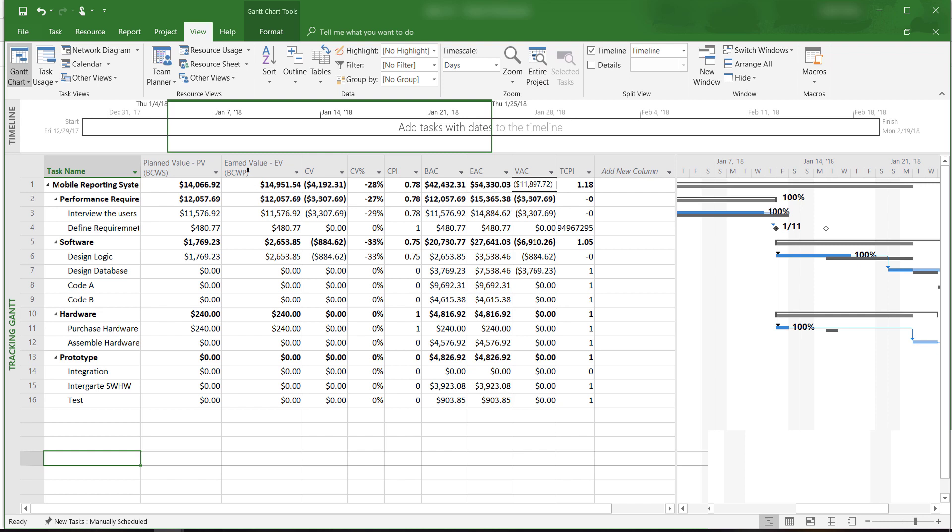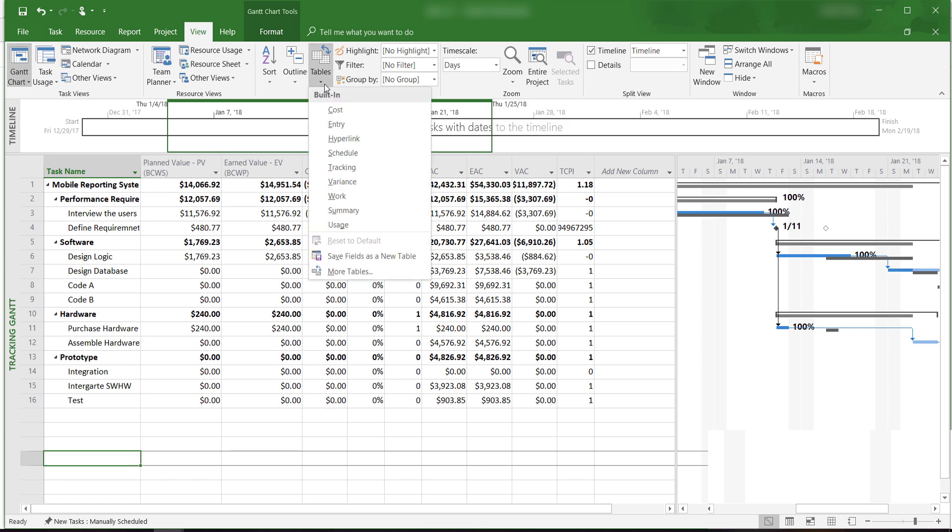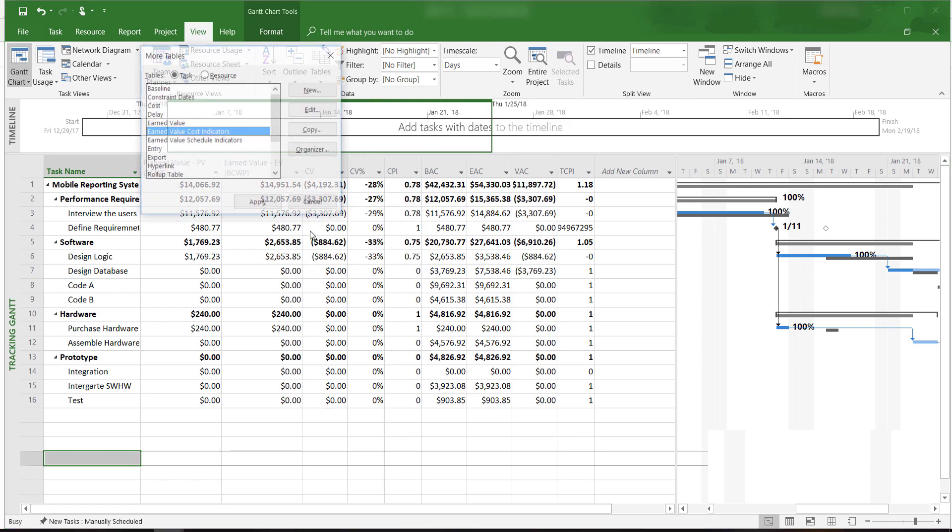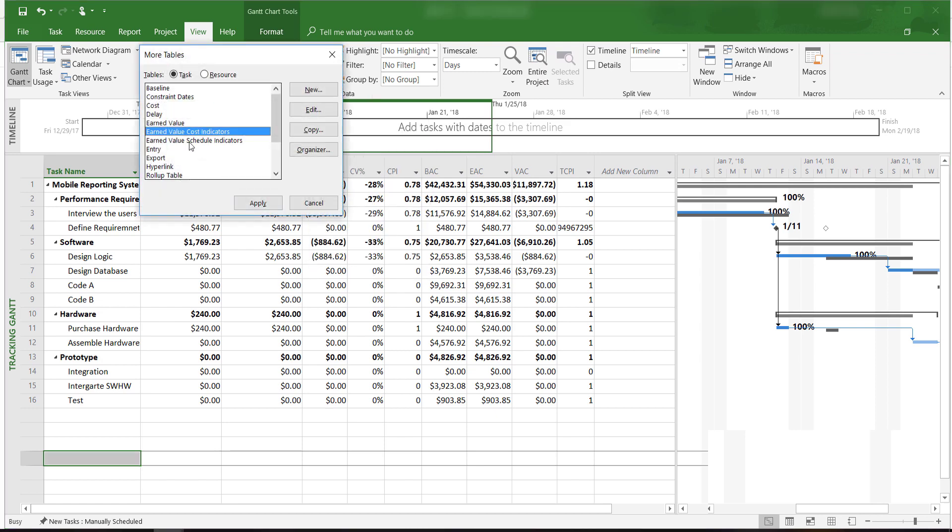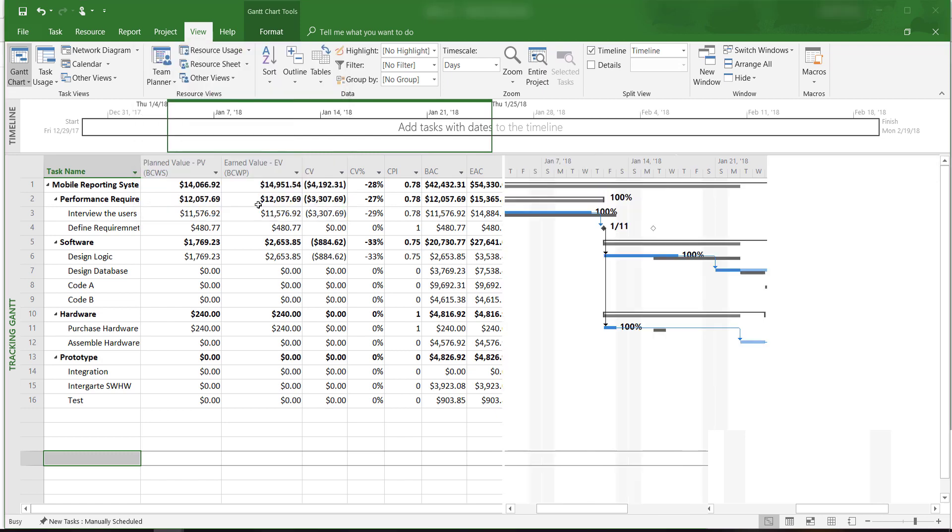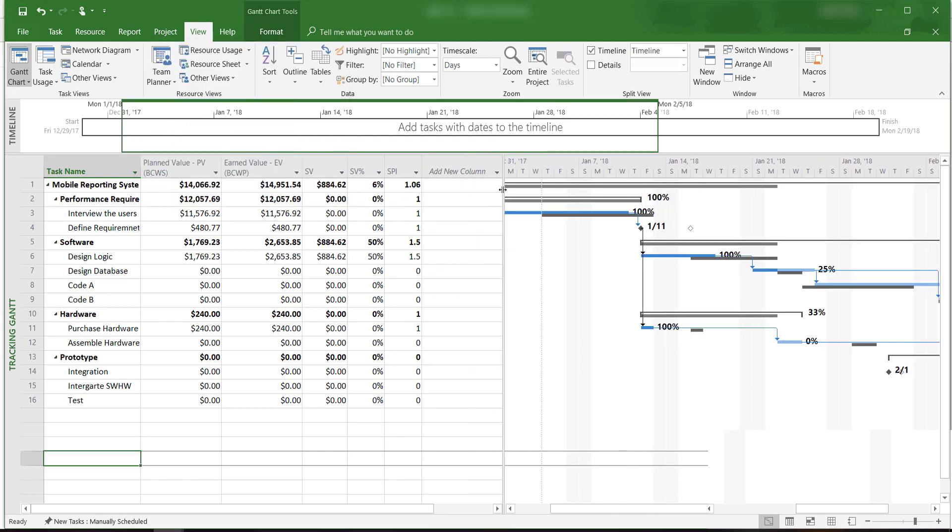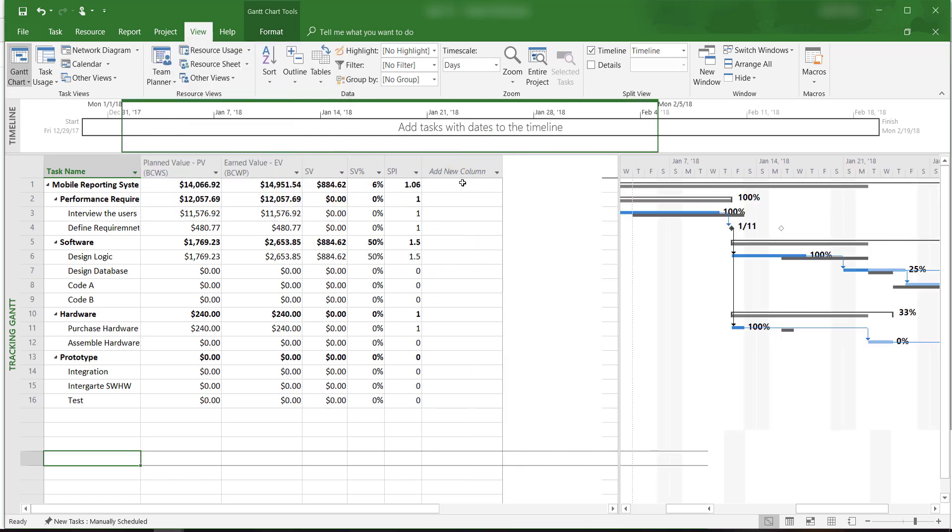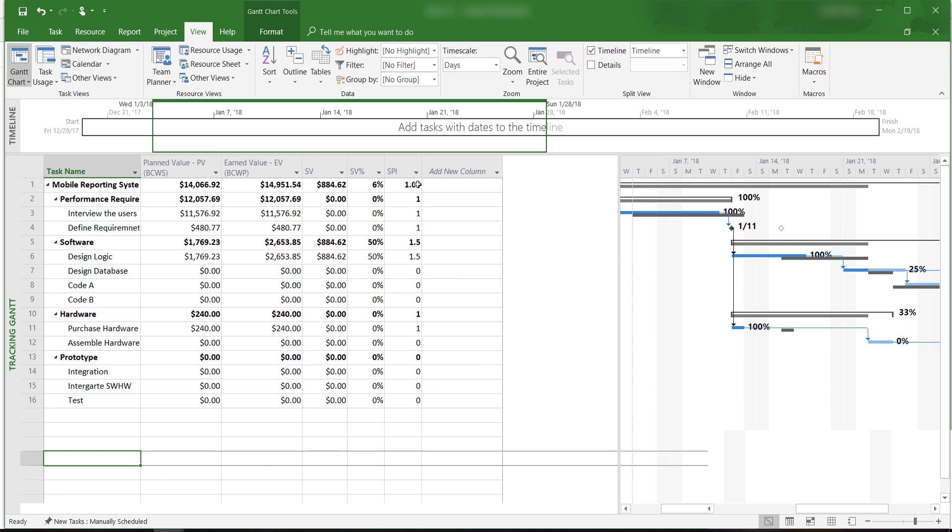To find SPI, we go back to the table's drop-down menu, click on More Tables, and then click on Schedule Indicators. Here, we see that the SPI is 1.06, which means $1.06 worth of work has been accomplished for every dollar worth of scheduled work.